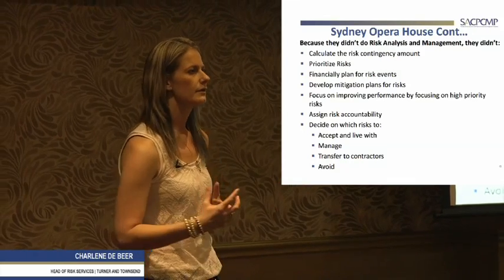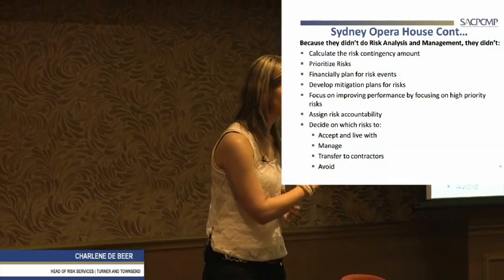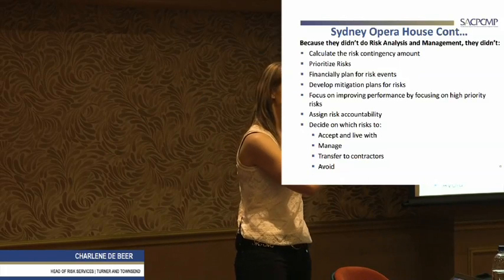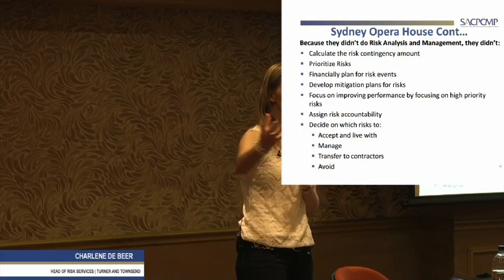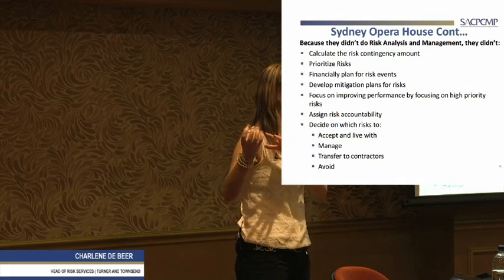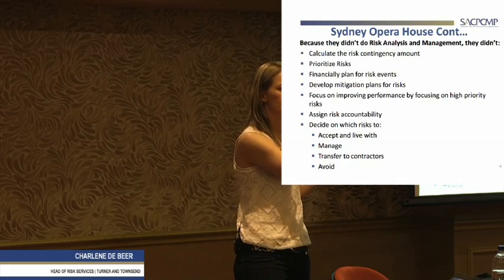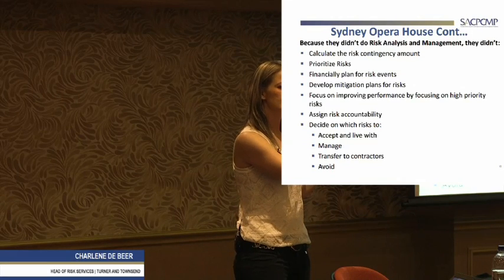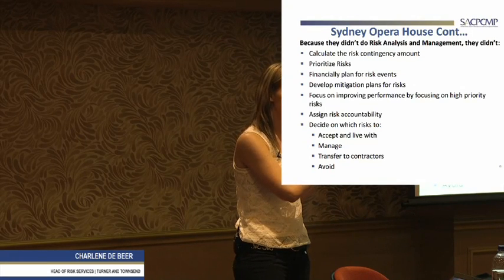So if you had made provision for risk contingency, it won't impact your project budget. You will do a drawdown from your risk contingency budget, that bucket, and it will pay for the mitigation thereof. But at least it won't impact schedule.